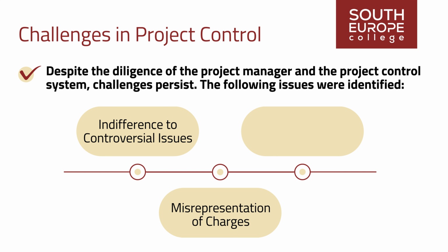Misrepresentation of charges. Managers overseeing multiple projects may misrepresent charges to offset poor performance in one project with achievements in others. While familiar in organizations with numerous contracts from the same customer, this practice distorts historical data, compromises ethical standards, and can lead to mischarging the customer.